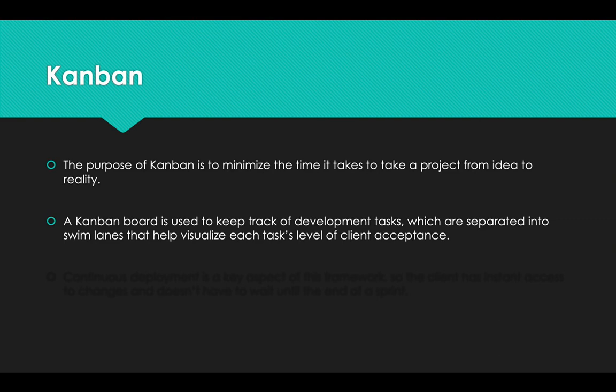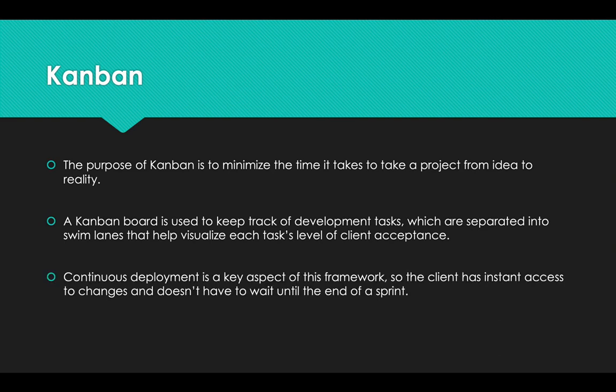And so what the Kanban board does is it allows you to see any bottlenecks, so places where tasks are piling up, and it's supposed to identify places where you can increase organizational efficiency and reduce the time it takes to get a specific task from the left-hand side of the board where nobody's really working on it to the right-hand side of the board where the client is totally happy with it and willing to pay for the work.